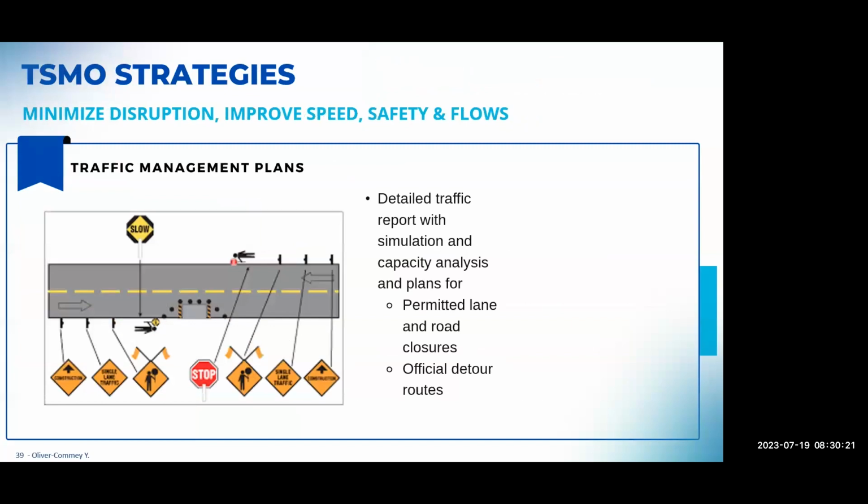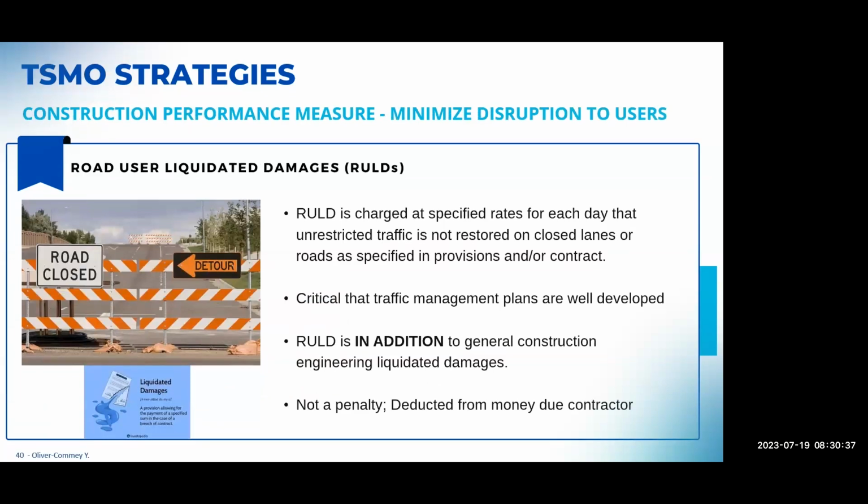When it comes to traffic management plans, it's also a more rigorous process for us because we have to make sure that we've analyzed all the different options that are available. We're very, very specific in what traffic management plans the contractor can deploy. And that's tied to the road user liquidated damages. So that's an extra liquidated damage in addition to the regular construction liquidated damages. But this one is tied to traffic and congestion.